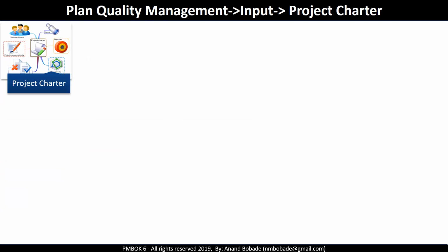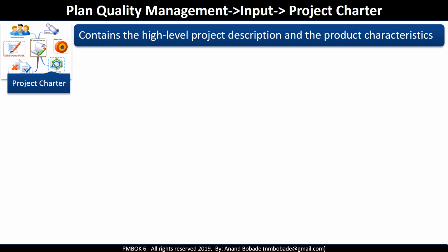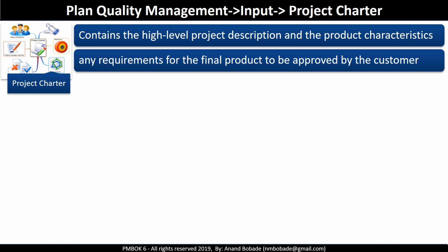Project charter contains the high-level project description and the product characteristics, which are the technical requirements. It may also contain any requirement for a final product to be approved by the customer as a part of validate scope process.